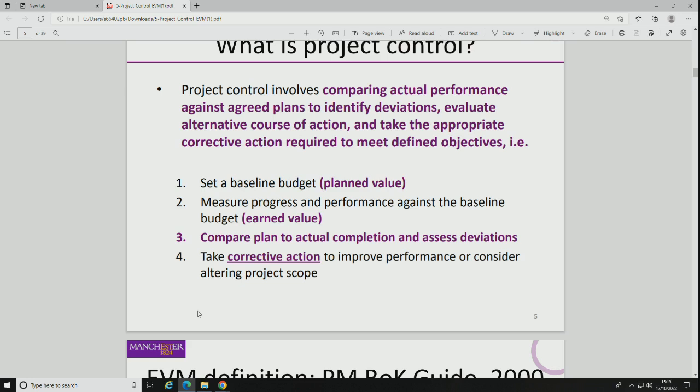You might need lots of safety operative staff. You can only do work when there are safety operative staff available. They may not be available. They might not be enough capacity. And all of a sudden you find you have to turn off the gas somewhere. You can't find the valve. You have to make another excavation 50 metres down the road and can't find that valve either.